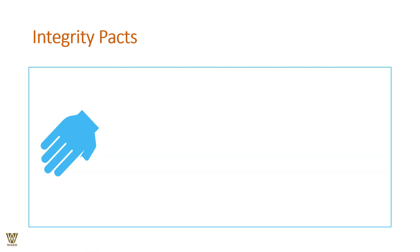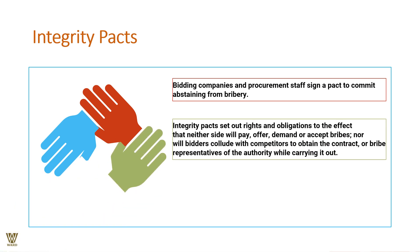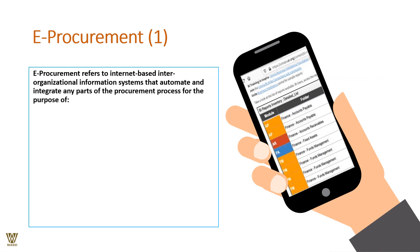Integrity pacts require that bidding companies and procurement staff sign an agreement — a memorandum of understanding — stating they are not involved in any malpractices. The integrity pact establishes rights and obligations stating that neither party will demand or accept anything improper, and that bidders will not collude with competitors. An independent watchdog oversees implementation to ensure all parties uphold their commitments.